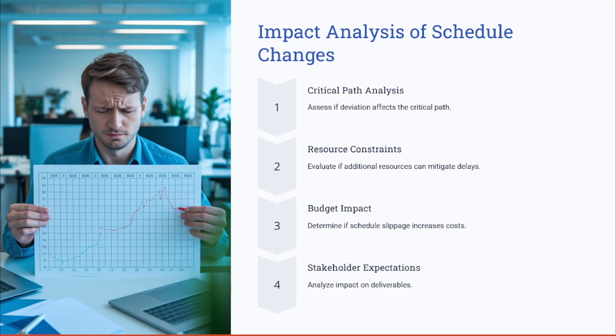If non-critical tasks are delayed, it may have minimal impact. Think of having a thorough impact analysis to help you as a project manager decide the best course of action. When doing an impact analysis for any changes in the schedule, you start with a critical path analysis, and ask yourself this question: does the deviation affect the critical path?